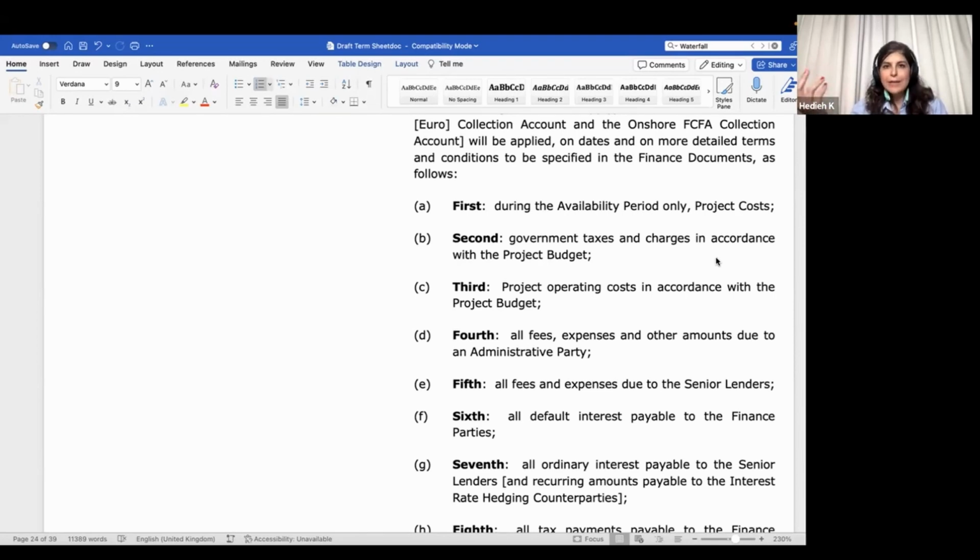But in reality, this cost item that we called management fee was actually a contractor who was coming and providing a service. It was a financial service to get the project to this financial completion date. So all the financial modeling services and all that is needed for that phase was included in that contract. So we sent them the justification and gave them the explanation of why this cost should be included as part of the OPEX, because it's a service that the project needs.